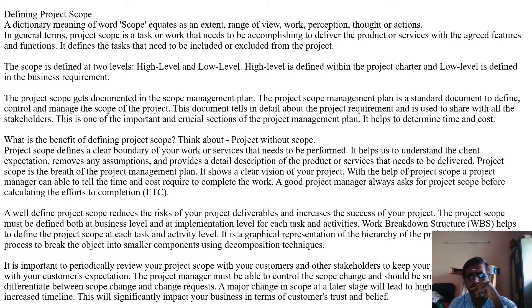It is important to periodically review your project scope with your customers and other stakeholders to keep your project goals aligned with customer expectations. The project manager must be able to control scope changes and should be smart enough to differentiate between a scope change and a change request. A major change in scope at a later stage will lead to higher risk, higher cost, and an increased timeline, significantly impacting your business in terms of customer trust.